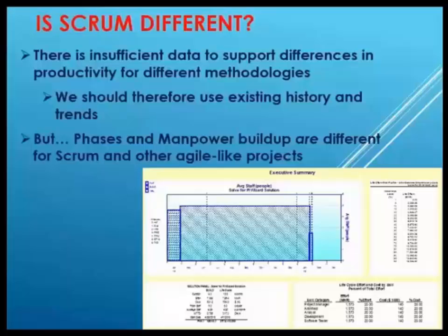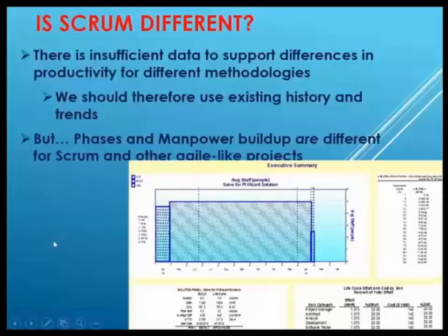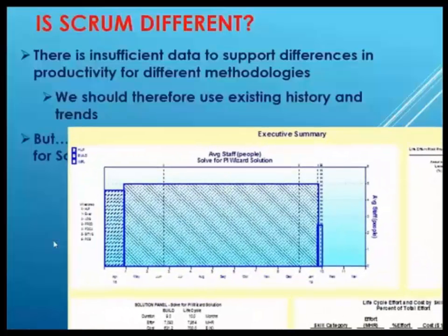And of course, high-level planning might be totally different. This one you see here shows about 4 weeks of high-level planning, but even that can be different. It could be 1 week of planning, but then other planning intervals throughout. And you can show that in a couple of different ways. You can show maybe 100% overlap between planning and a construction test. And we typically would have a very small warranty period for an Agile-like project.